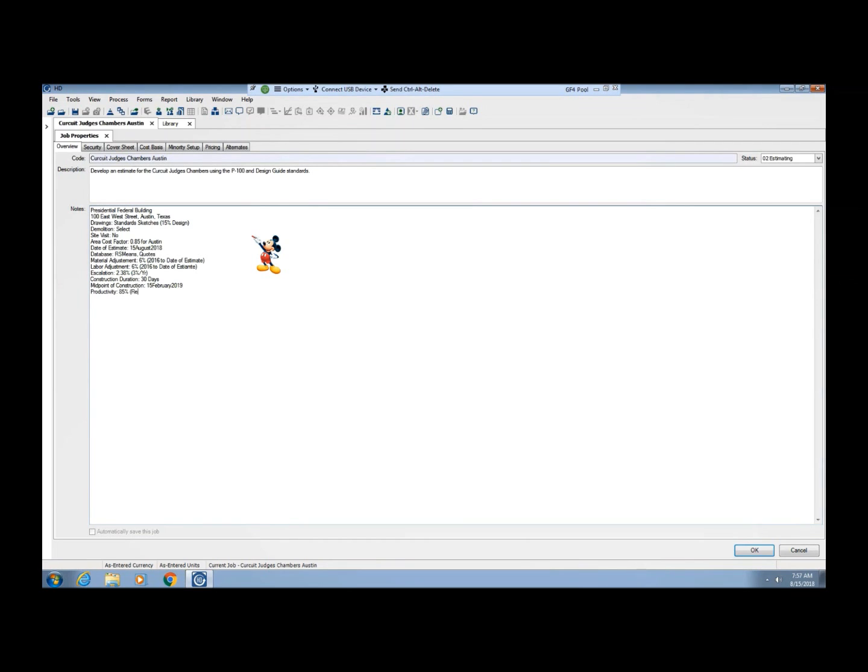Now, the subcontractors, they're not all the same. And in the past, we've been putting in the range that they all come in. We're not going to list them all out. So what we'll do is we'll put in like subcontractors, job office overhead is ranged from 10 to 15%. And then we'll do the same for home office overhead, and then profit. And we'll put a range. Now, overtime we'll note here as well, because a lot of projects have to be done after hours, that kind of thing. So this will be another thing to put in here.